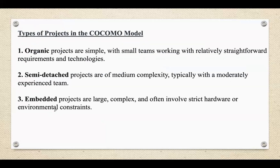Types of projects in the COCOMO model: software projects are classified into three main types based on their complexity, development environment, and constraints involved. These types help in determining the constants and effort multipliers used in the model's calculations. The first type is organic projects — small to medium-sized software projects that are relatively simple in terms of complexity and development constraints. The project is typically developed by a small team, requirements are well understood and stable, and the team is familiar with the problem domain. Examples include simple business applications, small desktop applications, or prototype systems.